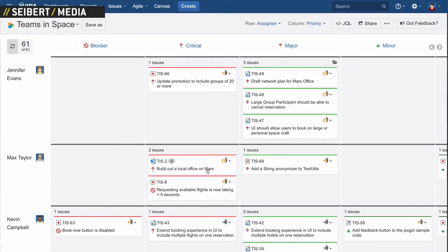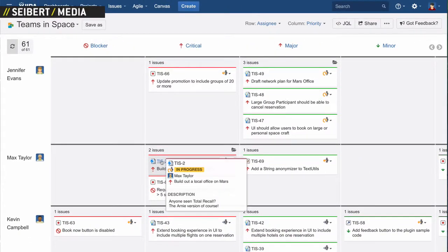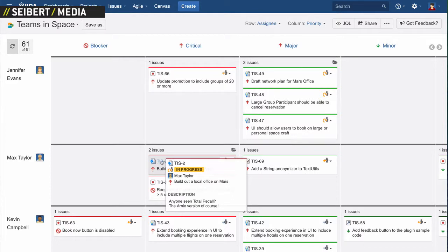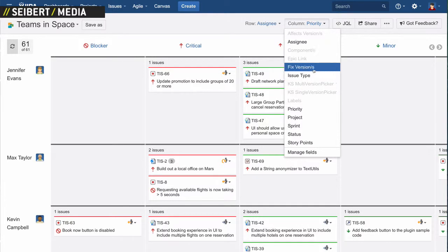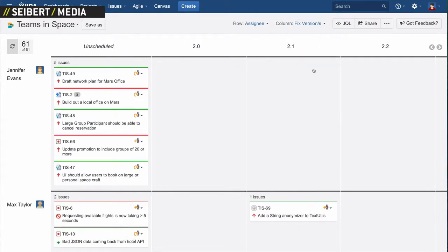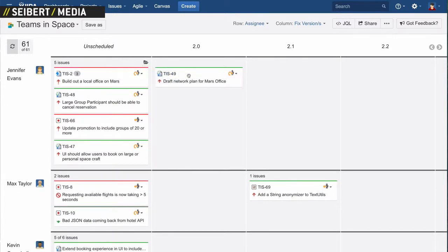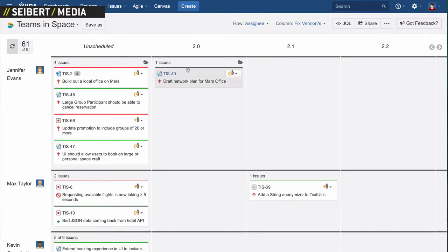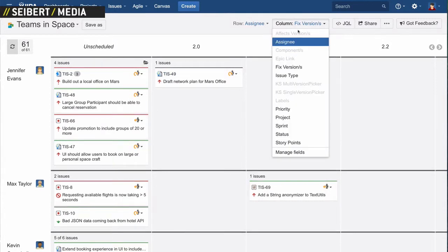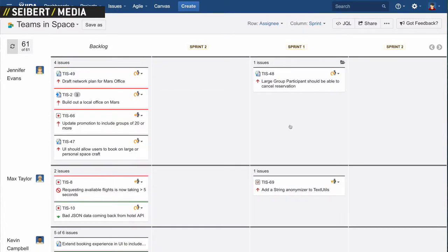So imagine this — this is very common when you're triaging and you have a lot of backlog. You want to see your open outstanding issues on many dimensions. I want to order by fixed version, so I have my different versions — this is kind of the schedule. So you can start doing some planning, setting up the releases. If you're working with sprints, same thing — you can put it in this sprint or another. Right now we're not able to change the sprints, but Atlassian is going to open the API.